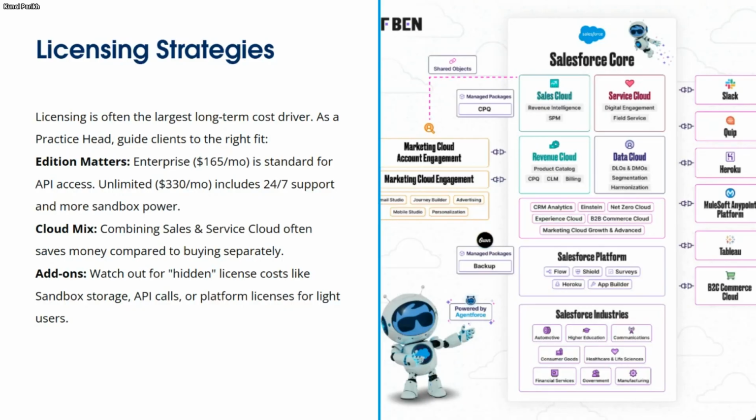In terms of hidden cost, for example for CRM or service, the dialers are typically external service providers, so the dialer cost gets added. You need to identify whether you want to integrate the dialer or not. Say you are taking anything from AppExchange via Salesforce, or along with your CRM you want a Tableau license as well, because analytics is a very important part.